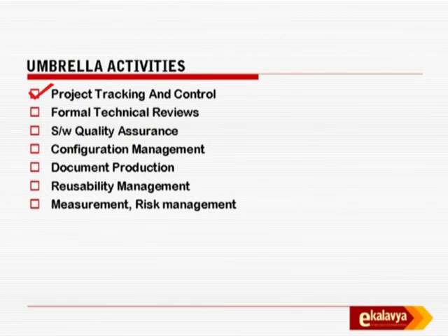Okay. The fundamentals of project management. Formal technical reviews. You asked about the document. Any document which is produced must be reviewed, and it must be reviewed by somebody other than the one who wrote it. Now you'll understand why software engineering has to be a team effort like any other engineering. So in a team of say 9 or 10 or 11 people, if you have three groups, one group writes specifications for something, that document must be reviewed by another group.